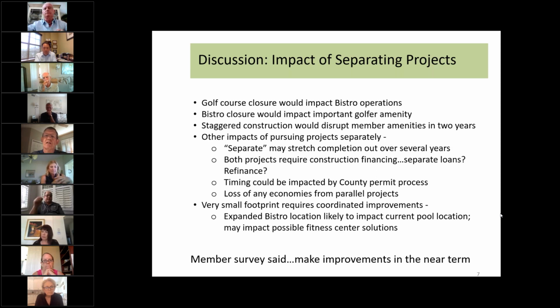Yeah, as we looked at the cost per member per month, what's happening with construction, according to Turner Construction, which is probably the biggest construction company in the country, they provide an index of what the construction costs are. And for the last 8 years, it's been running 4.5%. So the more we push it out, whether that 4.5% sticks or not, that's what it's been averaging over the last 8 years.